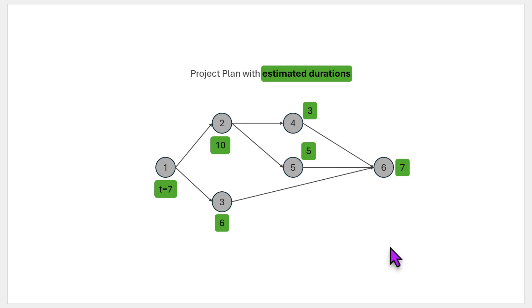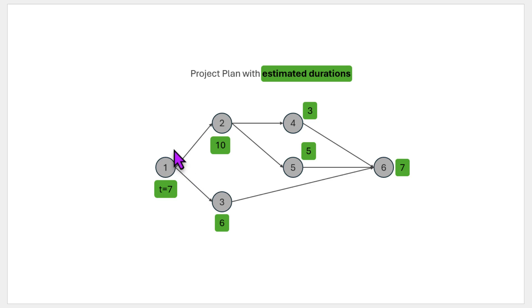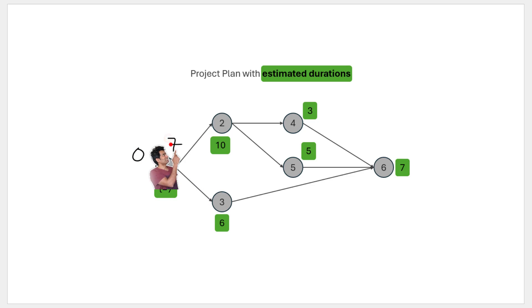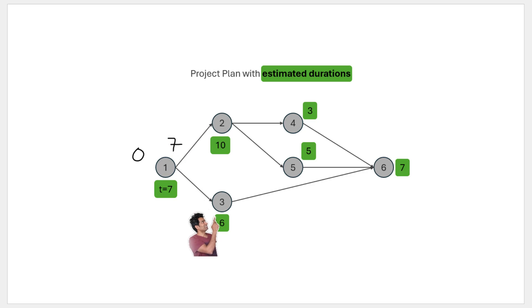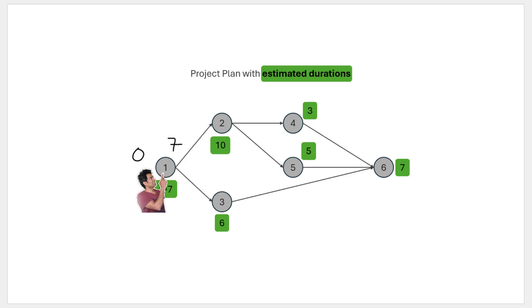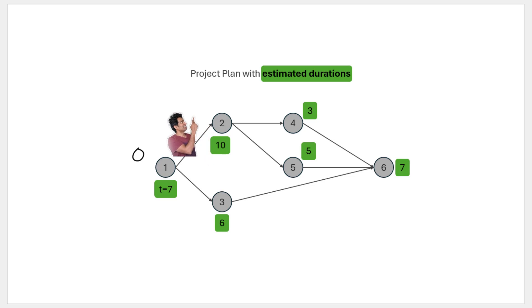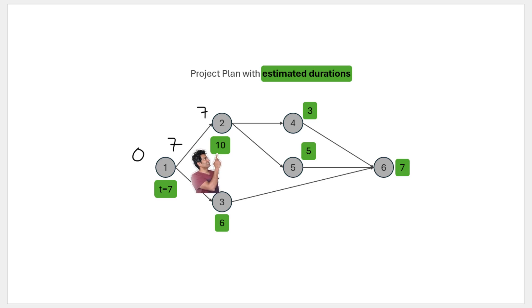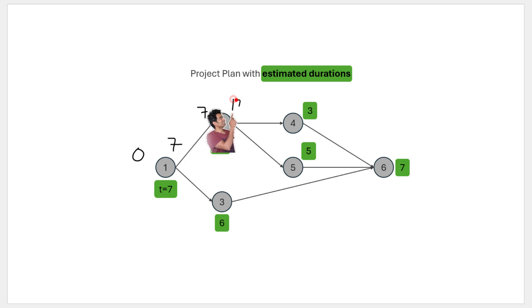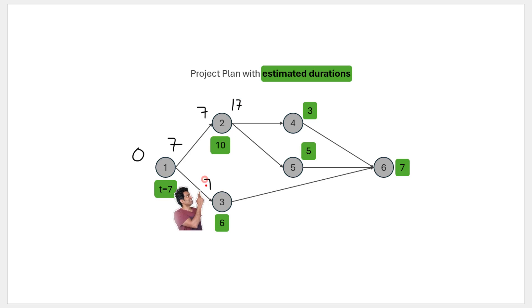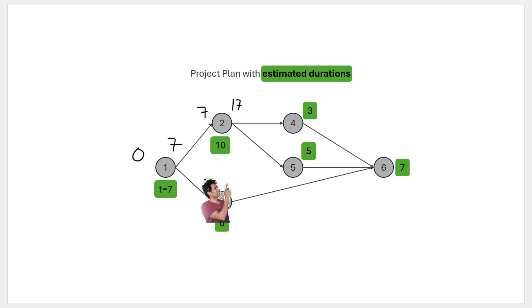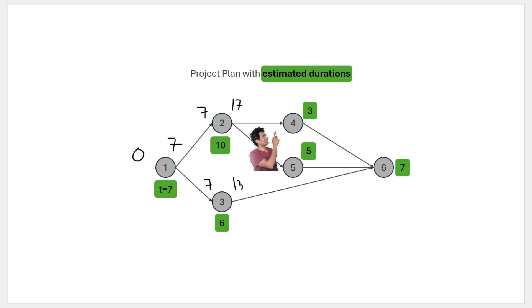Given this information, we can now perform critical path analysis and find out which activities are on the critical path. We'll just assume that the project starts on day zero. So by the end of the first activity, which doesn't have anything else before it, it'll be seven days. So we start on day zero and we finish on day seven here. And then comes activities two and three. Both of them can start in parallel as soon as one is done. So activity two can begin at the earliest on day seven, and then because it takes 10 days, the earliest we can finish activity two is 17 days. We'll do the same for activity three. It can begin at the earliest on day seven and it takes six days to complete, so it will be done on day 13.